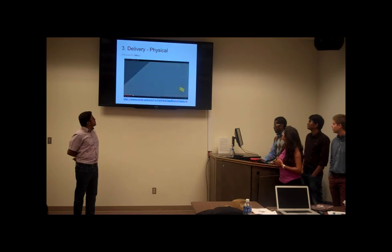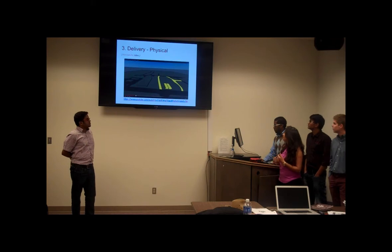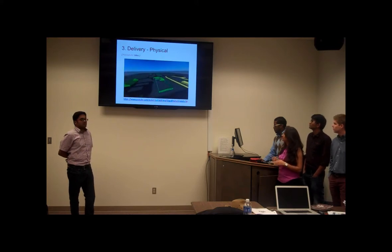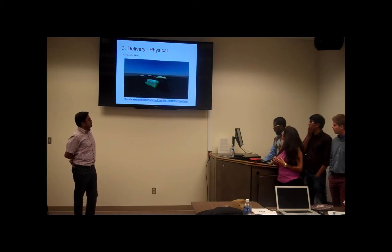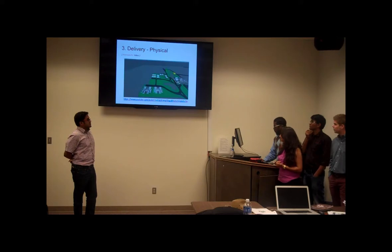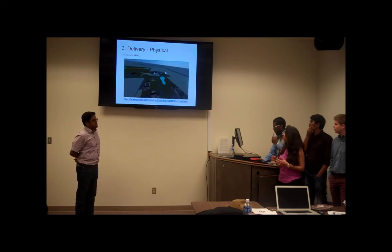So in the first phase we mainly have our school block, and the existing plantation house will be used as a recreational area. Also, we plan to build only the first floor of the school, and this is just a shell of the second floor. The rest of the school will be made in the second phase. This is the red barn, which has a private access, and the student housing units we plan to make 7 of them, out of which 2 will be used by the staff for the first phase.